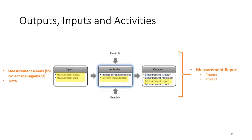The inputs, activities, and outputs are shown in a diagram. On the input side we need the measurement needs — what the project management is trying to capture — and then the data for those needs. The activity is to perform the measurement, and the result is the measurement report. It's important to distinguish between measurements for process and measurements for product.